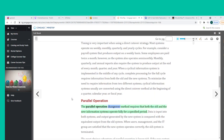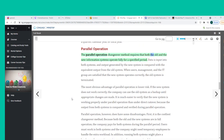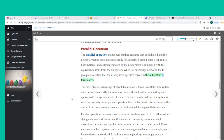The parallel operation changeover method requires that both the old and the new information systems operate fully for a specified period. Data is input into both systems, and output generated by the new system is compared with the equivalent output from the old system. When users, management, and the IT group are satisfied that the new system operates correctly, the old system is terminated. The most obvious advantage of parallel operation is lower risk — if the new system does not work correctly, the old system can serve as a backup.